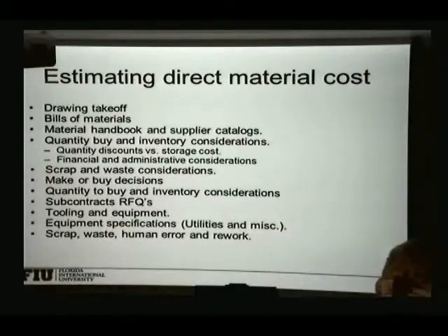When you estimate the amount of material that you need to cover an area, you have to think about if the unit that you receive the items in is going to fit in that area. And if you need to break or cut a section of it to make it fit, then the portion that you're throwing away is waste. So you need that waste to be taken into consideration when you do your estimate, because otherwise you're going to be short on materials. I'll give examples of that later on when we do the work.